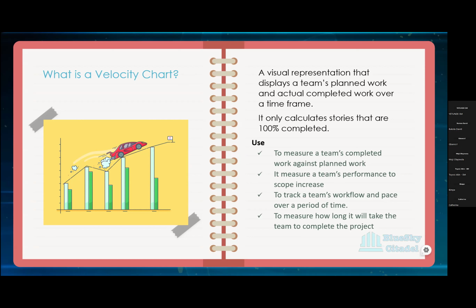So if you look at the pace at which they're working, with what the average velocity is telling you, you can categorically know that, okay, at this pace we will complete this project to timeline. And if we feel that at this pace we might not deliver to timeline, then it's for the team to sit down and look at what can be done to improve our pace. Why is our pace slow? It could be skill set, it could be more requirements coming in and all that.